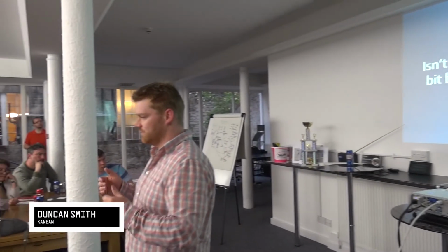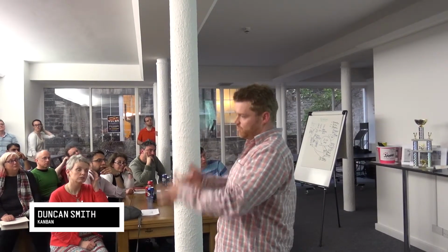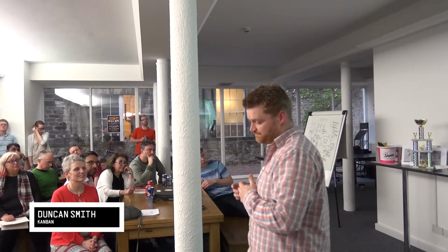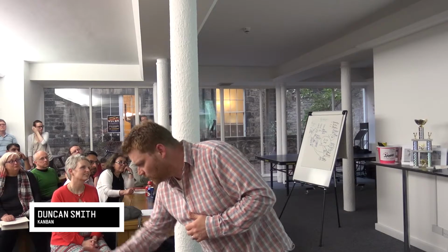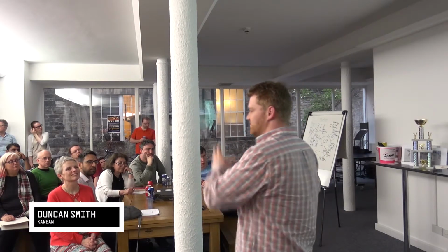Scrum is very much about time-boxed sprints. I start at day one, I've got 2 weeks to deliver my sprint, you put some work into it, and then you start going. Kanban is a similar type of process, but it's a pull type system rather than a push type system. So as you move through it, you have to make sure that you're not putting more work into the system than it can actually handle. One thing that's missing from this that you might have seen on boards is an expedite row. I've left it off, but there are occasions, as I'm sure you know, where some fancy VP comes along and says, I need it now. So it goes into a queue and it moves its way across the board in an expedite row.